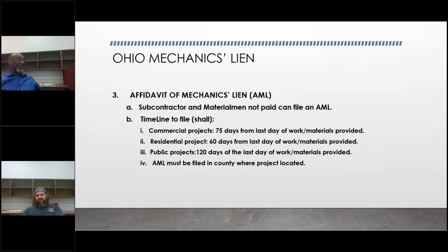That's something we'd have to look at the specifics of the job, and whether or not you should waive, because that's a management decision, and that's a risk that you take. If you don't waive the lien, then you might lose the business. And the saving grace on the lien waivers is that it's always pursuant to the exact dollar amount of the payment coming in. This is usually when you're getting into the AIA schedule values, monthly pay applications and things like that. So you sign a conditional waiver for the specific sum of money, which basically states that the check for that portion of the project is going to go to the affected vendors and subcontractors, whether it's my building supplier, equipment supplier, what have you.